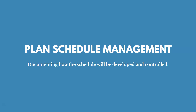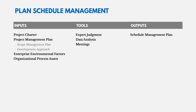Looking at Plan Schedule Management — documenting how the schedule will be developed and controlled. The inputs include the project management plan, project charter (which may have schedule milestones), enterprise environmental factors, and organizational process assets. Your tools are expert judgment, data analysis, and meetings. You might get expert advice about how the schedule ought to be prepared, and then you can meet to plan things out.